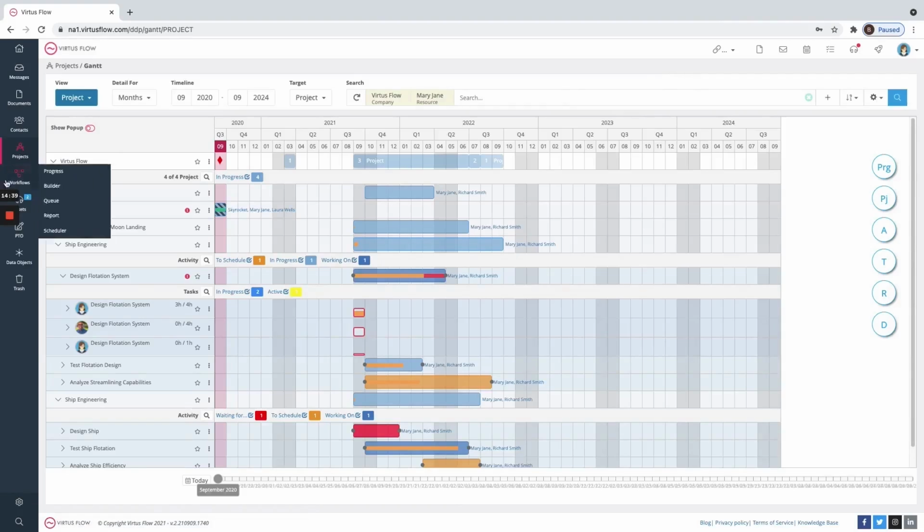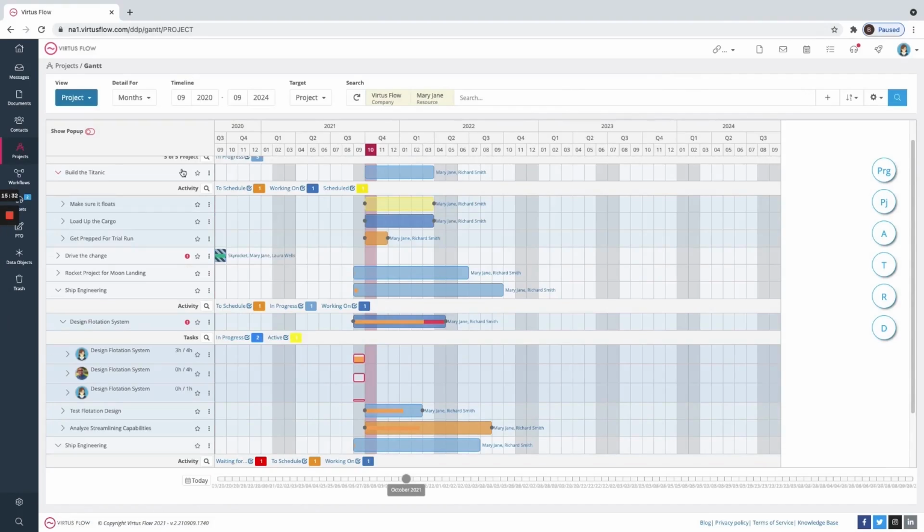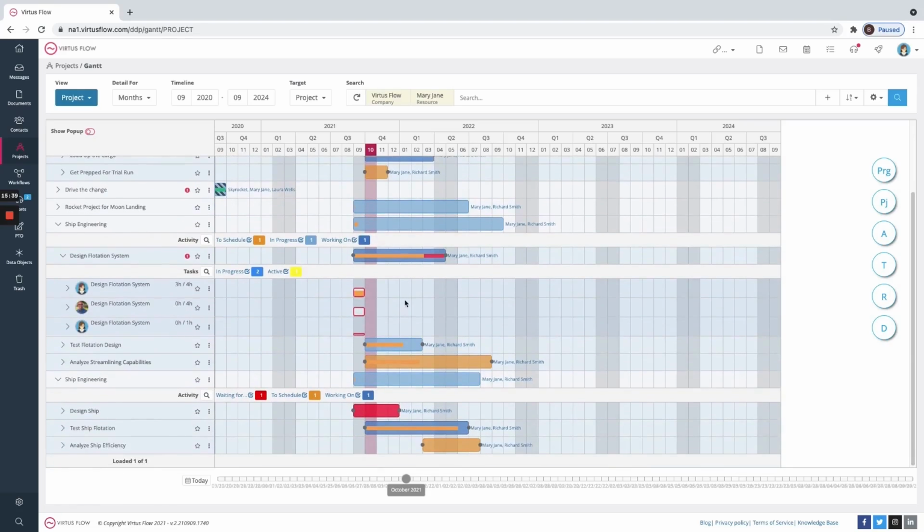Then, when you go to the Gantt bars, you'll see them. As you can see, here's the project and all of the activities. So how do I get it to have even more things like this? Well, for that, I have to add activities and tasks. But what's the difference? These come from the PMP framework for project management. But basically, a task is something that needs to be done at some point, but it's not specified who is assigned or when it needs to be done. An activity is something planned for a certain time and is assigned to a specific person.